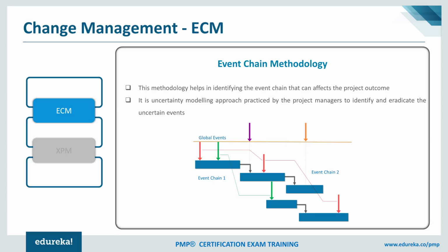So that means this methodology actually focuses on risk identification, right? So I don't know if you have heard of it, but there is one technique that is used very popularly in project management, and we are going to cover it as a part of this training later, which is called Monte Carlo analysis. As a part of Monte Carlo analysis, which is a part of the event change methodology, we identify uncertainties at a very early stage in the project and we simulate the whole thing. So when we are doing the planning, we are trying to simulate what kind of risks might come with respect to getting the material for the project, getting the resources on the project, or uncertainties in terms of scope. So if tomorrow we start working on the project and suddenly we have a lack of resources, how would that affect the project?